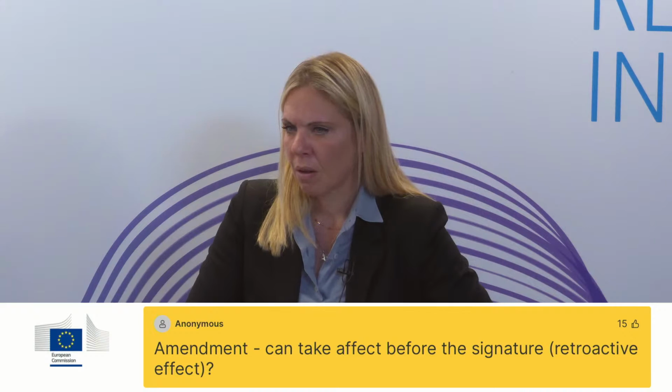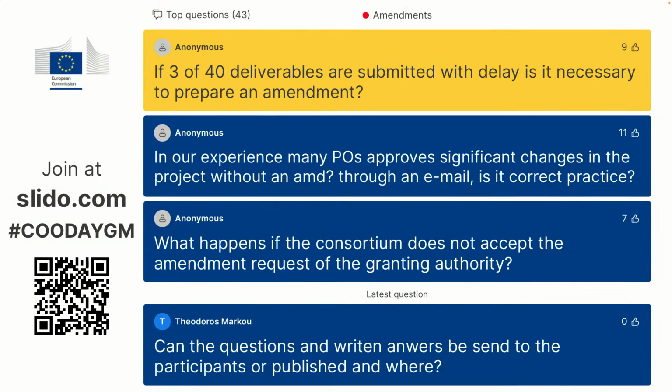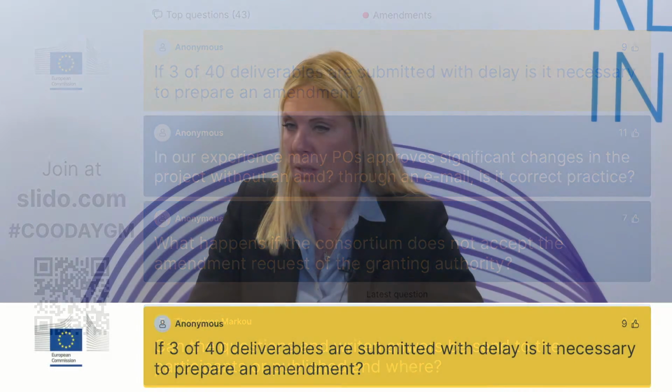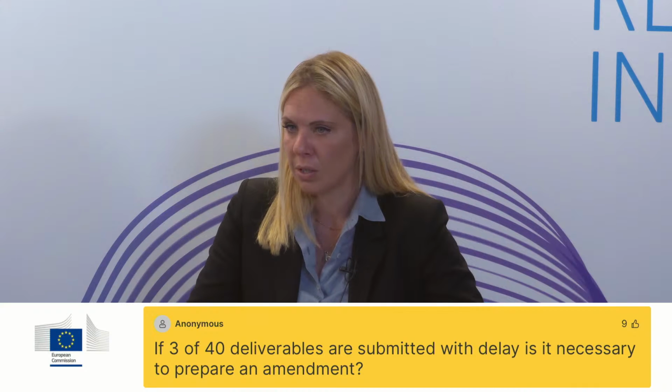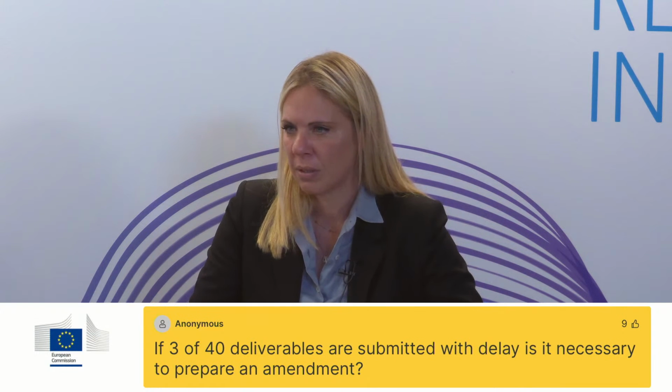Okay, next question. If 3 out of 40 deliverables are submitted with delay, is it necessary to prepare an amendment? Agnese? No, it's a reporting matter. So during the reporting, you will justify, and no, it's not necessary. It doesn't change your tasks, the work plan, or the content of your project.